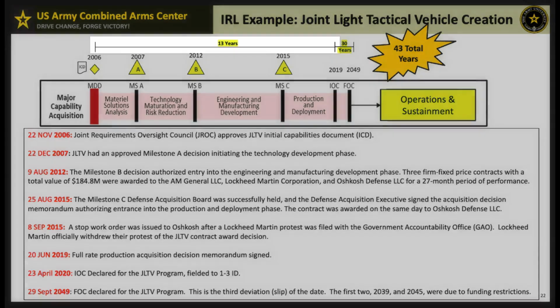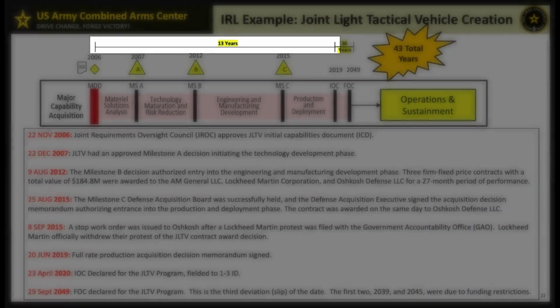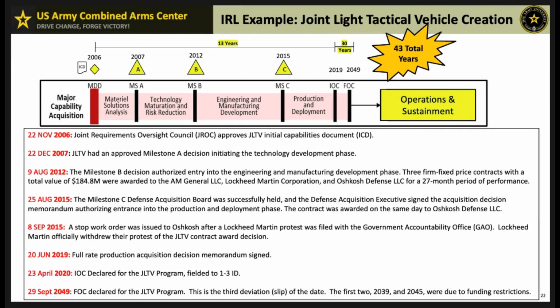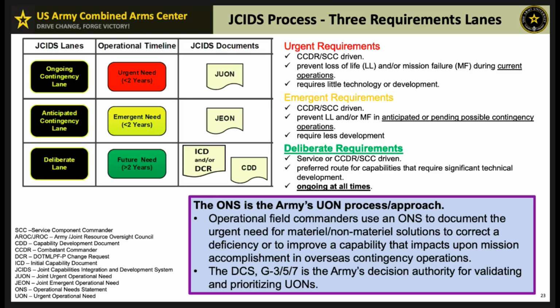So it took 13 years for the JLTV to progress from the material development decision, MDD, to initial operating capability, IOC, and it's expected that it'll take 30 more years to achieve FOC. The JLTV program exemplifies the long-term nature of developing and fielding advanced military capabilities.